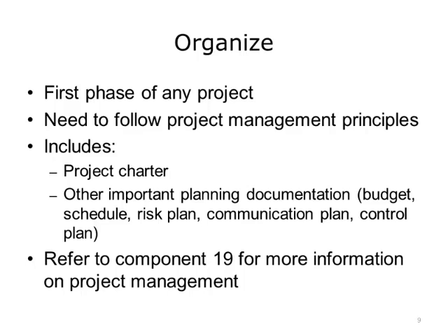The first step or phase in the life cycle is organize. It is key to follow project management principles and include in a project plan the project charter and other important documentation. Examples of planning documentation are budget, schedule, risk plan, communication plan, and control plan. For more information on project management, refer to Component 19.